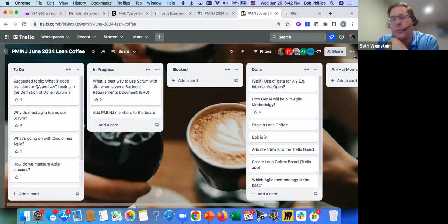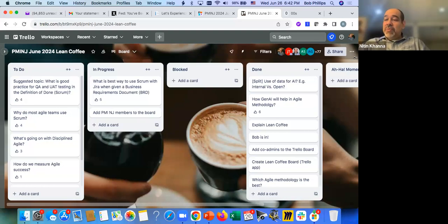One comment with BRDs is sometimes you're in a regulated industry, and so you have to have the BRDs there. What I've done in that case is change the SOP so that the BRD as written would be the equivalent of the SOP, the compliance documentation. So sometimes you have to go back and actually change how the whole organization is managing their compliance program in order to handle it. That's great, Chet. We need more people like you doing things like that that'll help the organization.